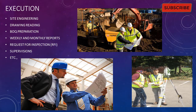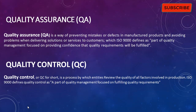After execution we have quality assurance and quality control. The quality assurance person decides the guidelines — which codes to follow, which quality to maintain, and provides specifications for the project. The quality control person maintains, checks, and controls that quality directly on site. For example, if you are doing shuttering, he checks whether the oil is applied properly, screws are tight, no voids are present, and jacks are tightened. These are all quality control activities. Both quality assurance and quality control are very important fields.